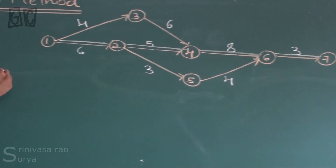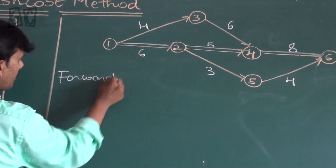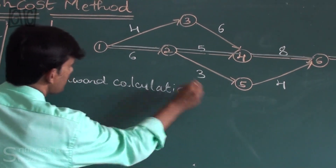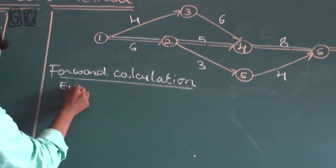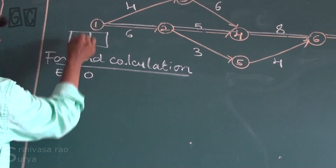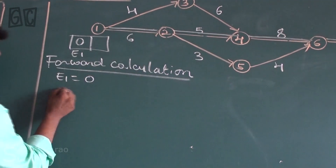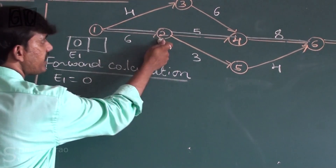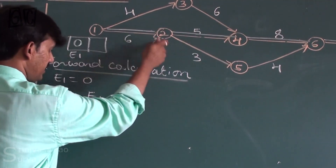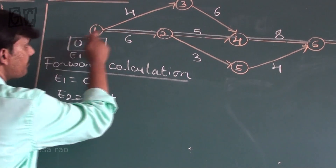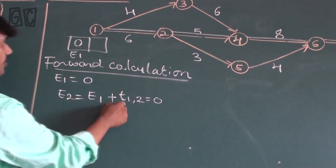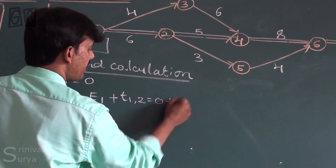Now I want to change the power calculation — the forward calculation. Fix E1 equal to 0. E2 is coming from E1 plus time taken from 1 to 2, so the value is 0 plus 6, which gives E2 equal to 6.